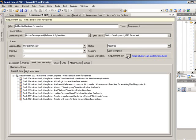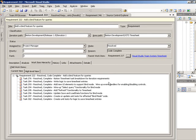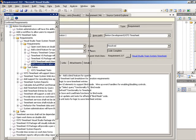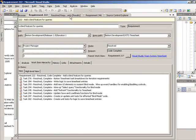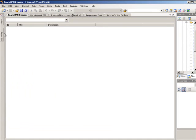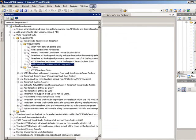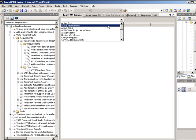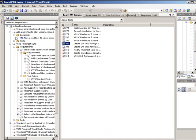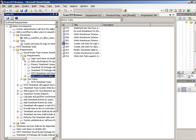We can construct these specified parent-child relationships by either taking an existing work item, selecting the parent directly from the work item, or by using TeamRM to make mass selections to show which parents and which children actually relate to each other. We'll do this for the use of the work item browser. Here in the work item browser, we can query for work items and then relate those work items to a specified requirement. We'll then be able to see a roll-up of exactly which tasks belong to a requirement.